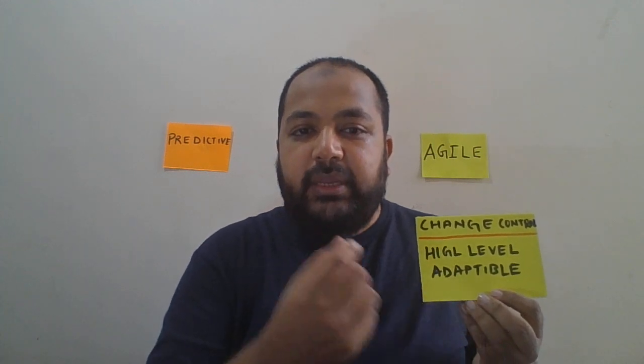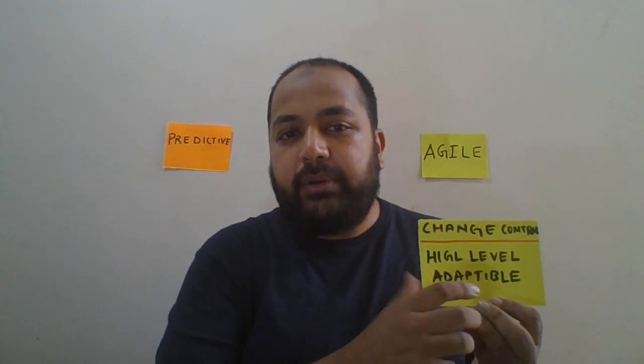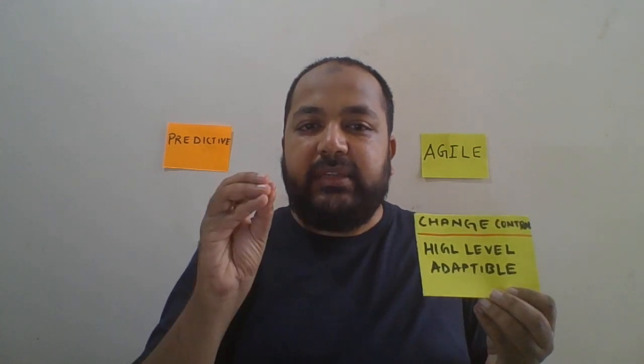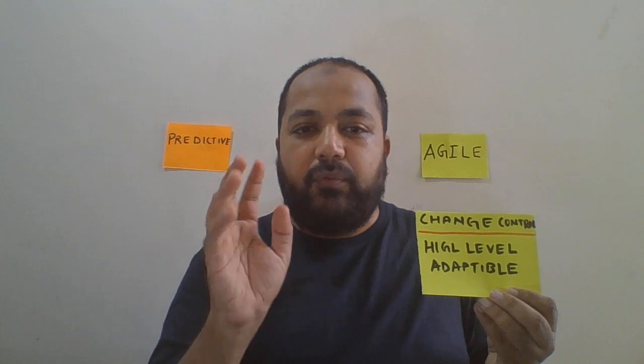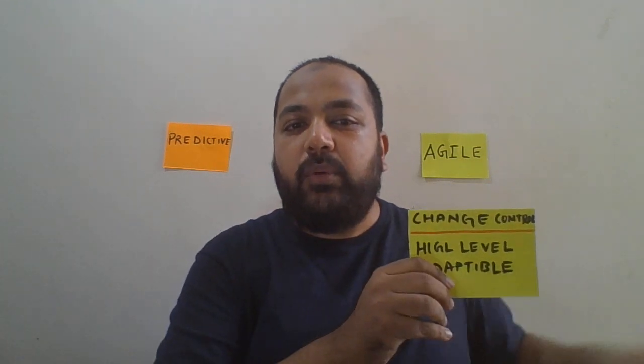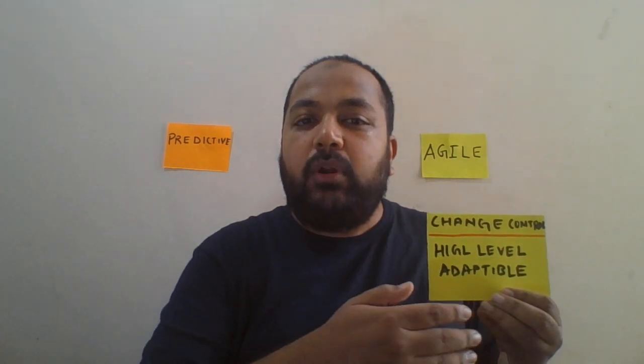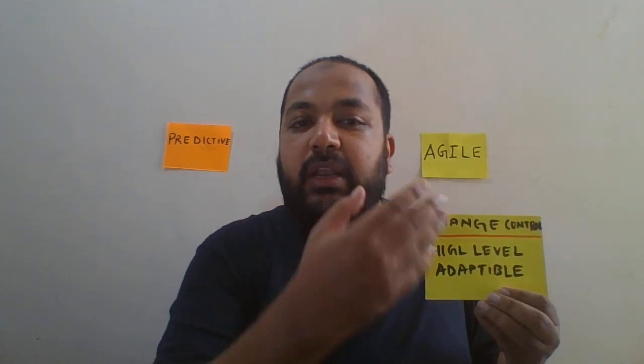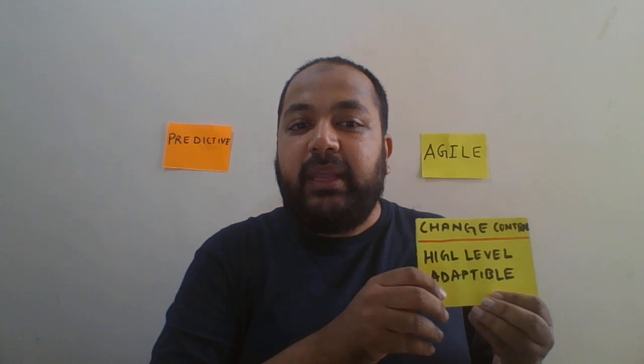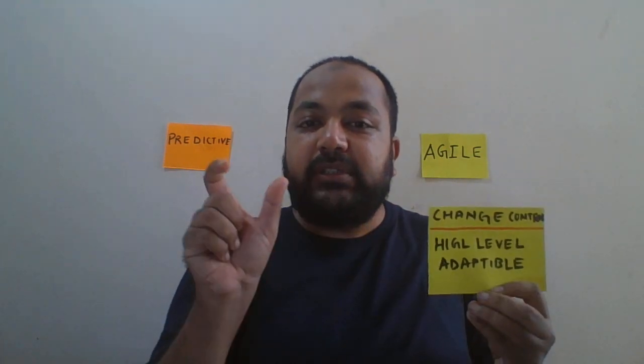So what happens is if that new heart button comes in over here, something has to go out. Getting it? If it's just like say 5 story points or a 5 day work or a 4 day work, I'll have to remove some other 4 day work and get that into this project because that's got more priority. So Agile is more about prioritizing what is the value for the user, right? But again, at the same time, you see what can be done in this much time frame.